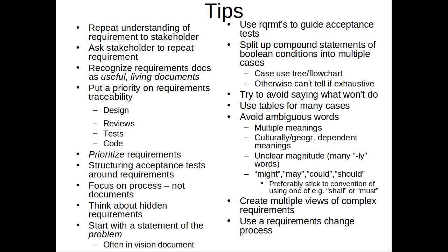Yeah. Because the cost of changing it grows exponentially, and if you can keep it cheap at the start, it's good. Okay, so I like that. If you change a requirement later, it affects a lot of things. As I drew in a diagram last time, there's exponential growth in the cost of correcting something later in the game, because you have to throw a lot of stuff away. Yeah. Having a process for changing the requirement beforehand will make the actual changing a lot faster than trying to figure out a plan on the go.